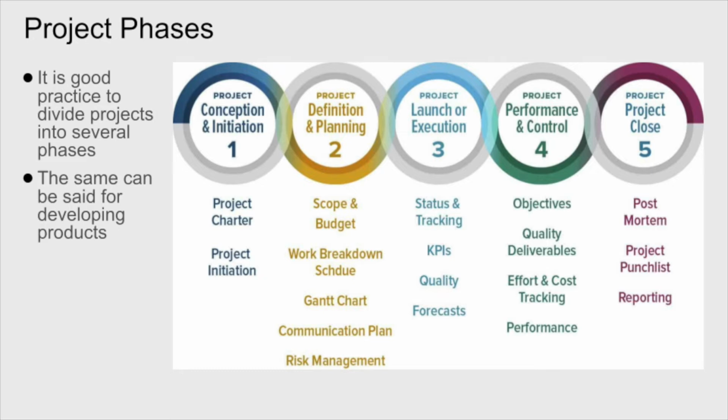Towards the end, how far are we along in this project? Percentage of completion. KPI stands for Key Performance Indicators. Did we do what we said we were going to do? Did we make our target? For example, if we said we're going to get this project done in 12 months, in the first month, have we done 1/12 of the project? That's effectively what we're looking at.